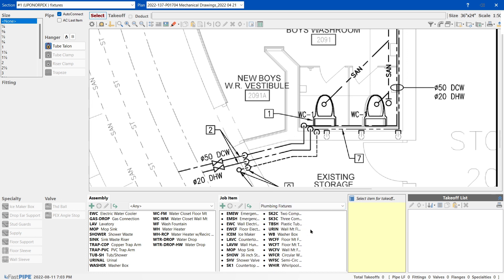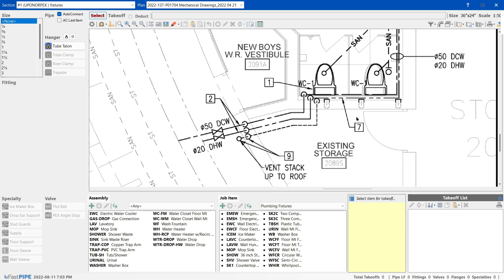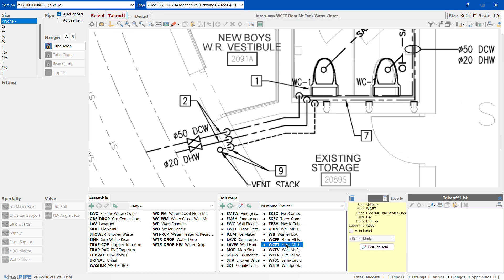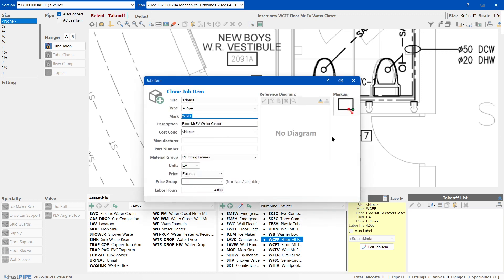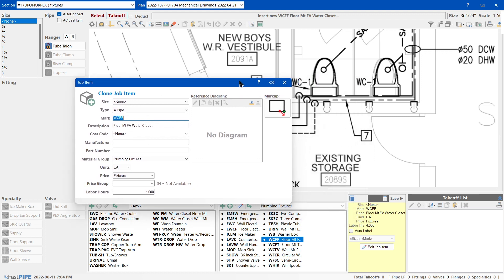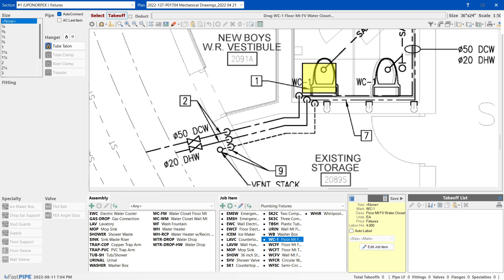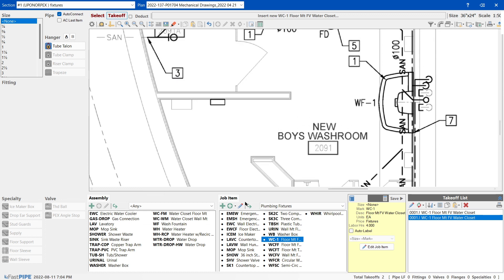Now I'm going to start doing a takeoff. I go to plumbing fixtures because it's all fixtures here. If I don't find anything I always write it - WC1 is a toilet so if I look for water closet there's two water closets: one's a floor mount, once a wall mount, once a floor mount flush, once a floor mount tank. I'll click on here - it's a toilet with a tank but whatever - I'll clone it and write WC dash one. Then I'll do this, then I'll come here - water fountain. I don't know what that is, it looks like a water fountain, but I can't find a water fountain.